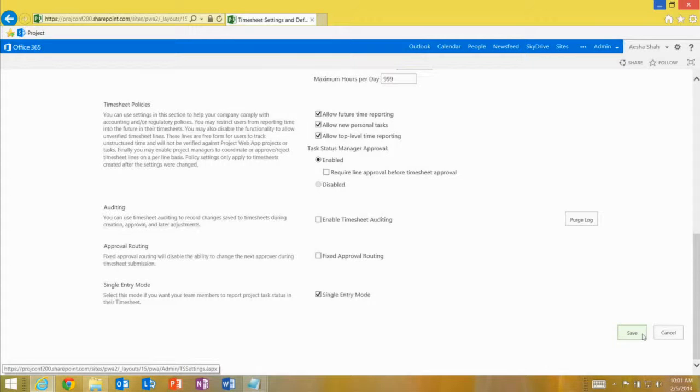What I always say is the project manager is the only thing that stands between the project plan, the way it's supposed to be, and a team member submitting mistakes. With auto approval rules, mistakes automatically get into the project, and it's really difficult to back them out once they're in. So that answers the question? Thank you. All right, back there.